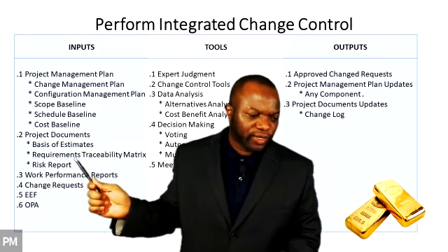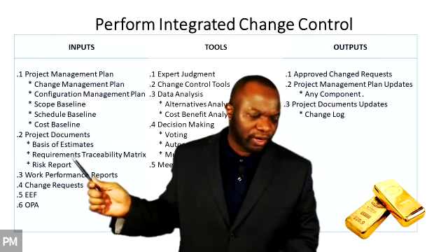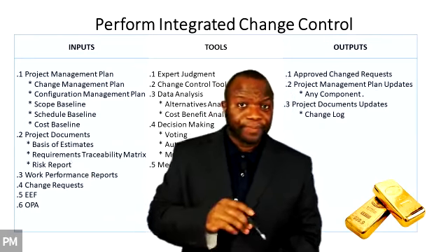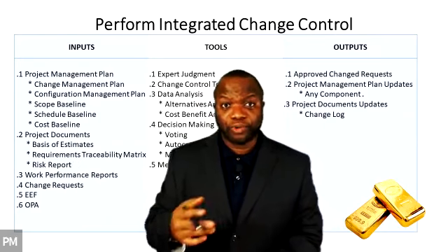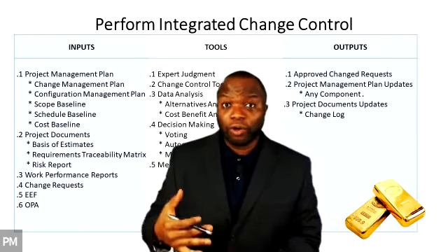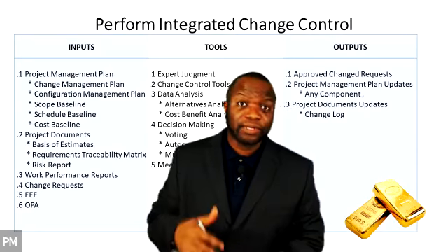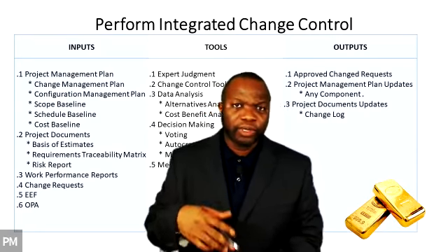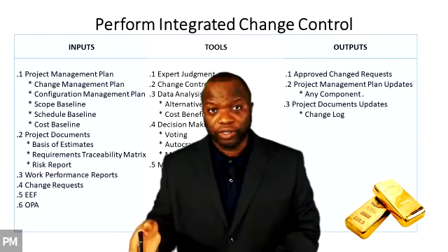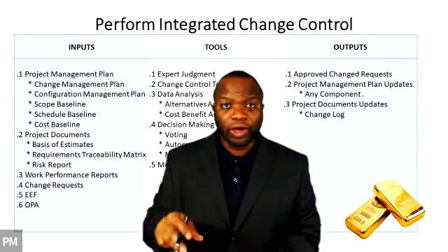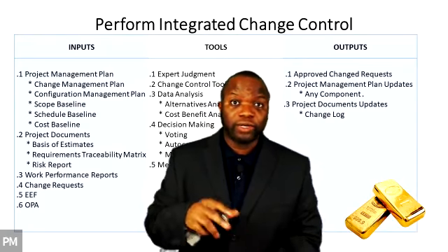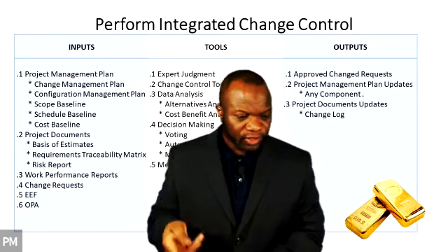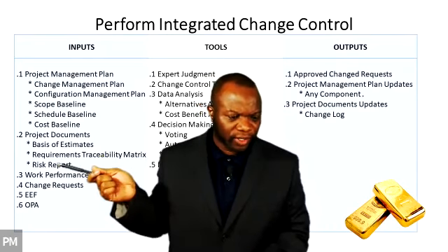Now, this refers more to project scope because product scope begets project scope. If you want additional scope in the product, it will add or may add, under most circumstances, additional scope to the project. What is product scope? Features and functions in the product. What is project scope? The work that must be done to achieve the product scope, or requirements, if you will. So we've got to remember all these terms when we look at this.